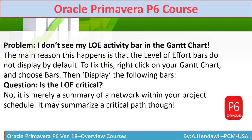One issue when you add a Level of Effort activity is that it will not be visible in the Gantt chart by default. To fix that, I'll go to the live software and show you how to display it. Another common question is whether Level of Effort is critical — LOE is not a critical activity. It simply summarizes activities that may span the critical path or summarizes any phase of the project.